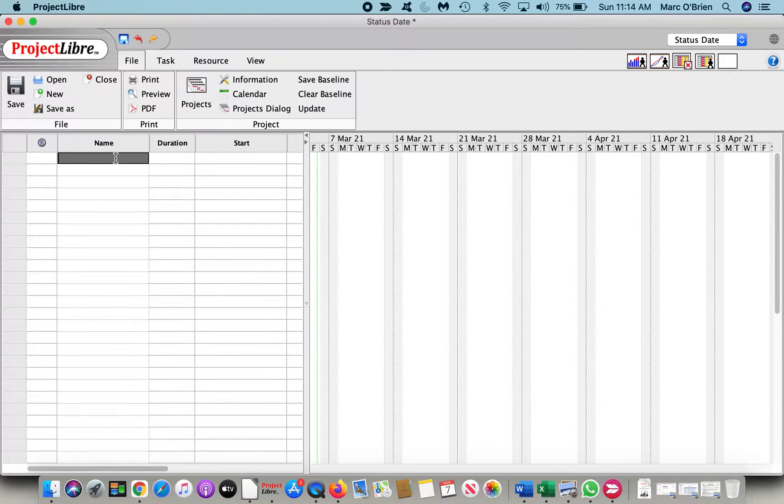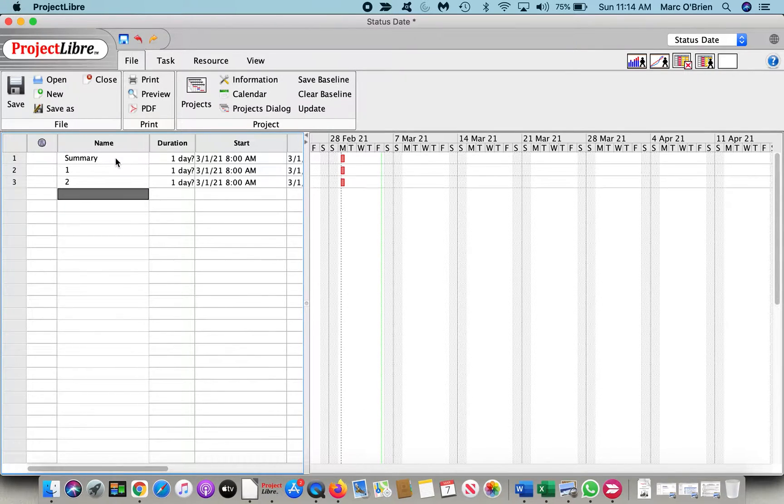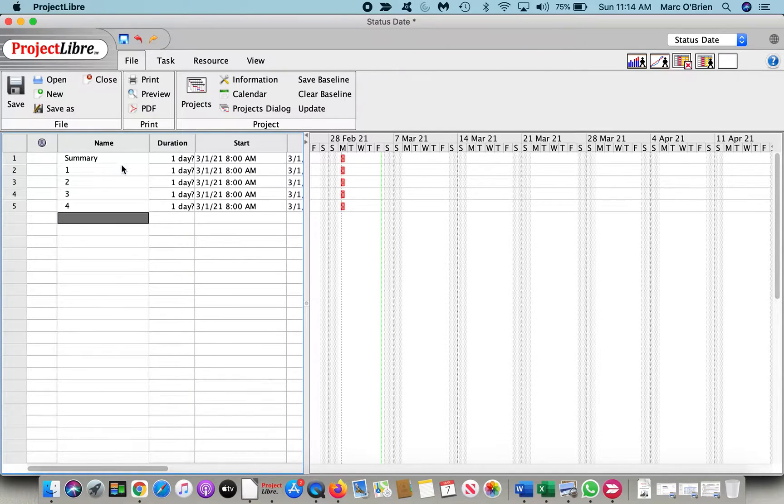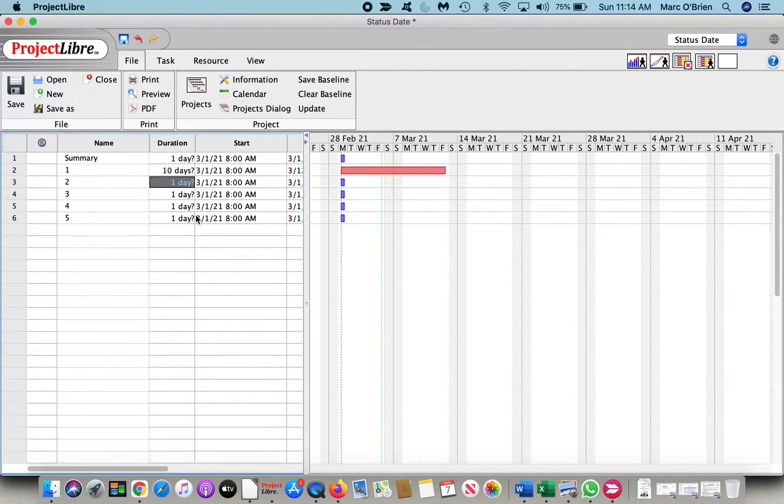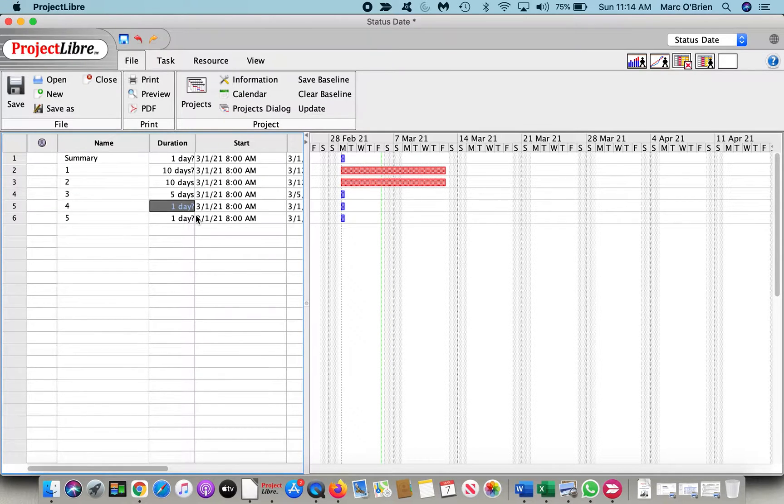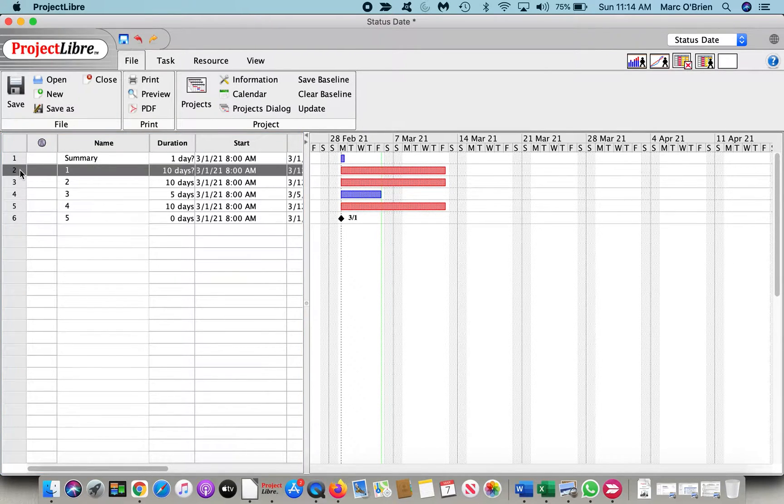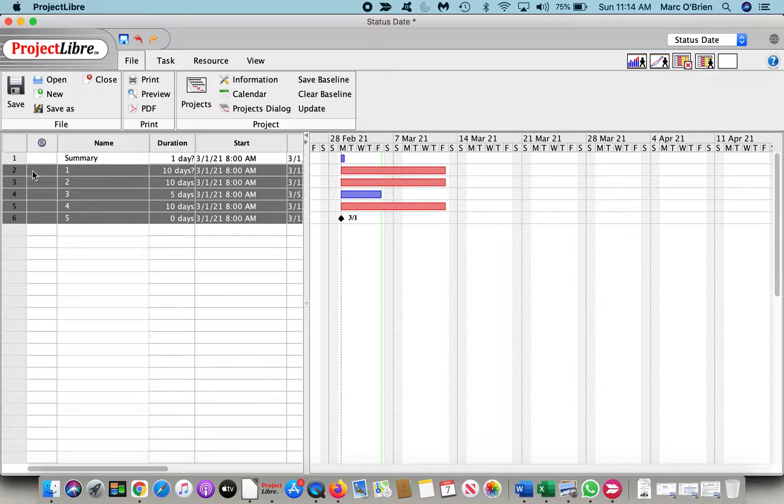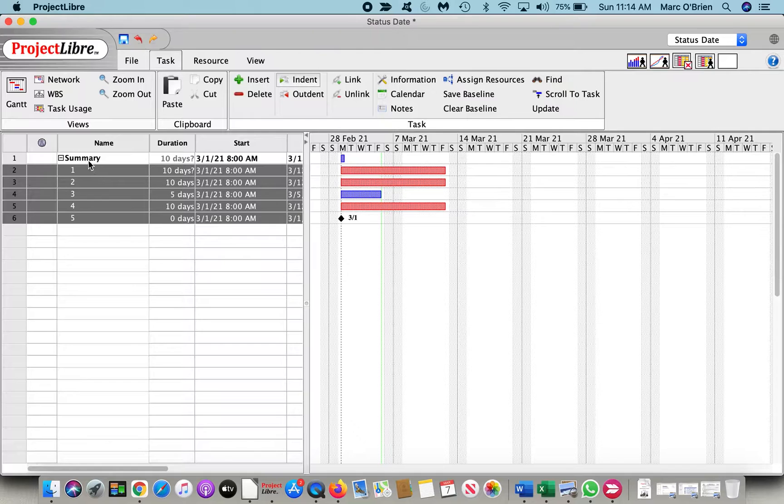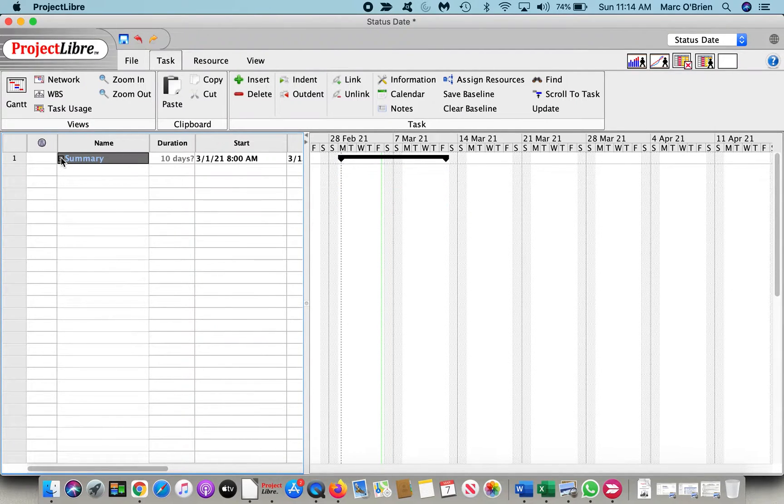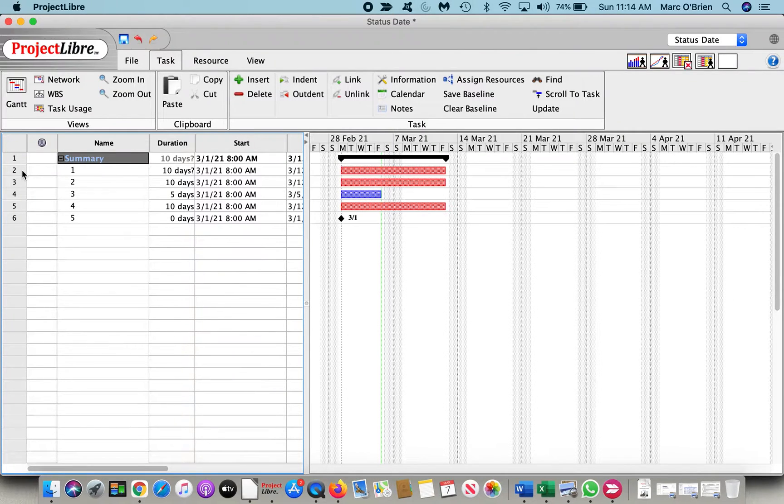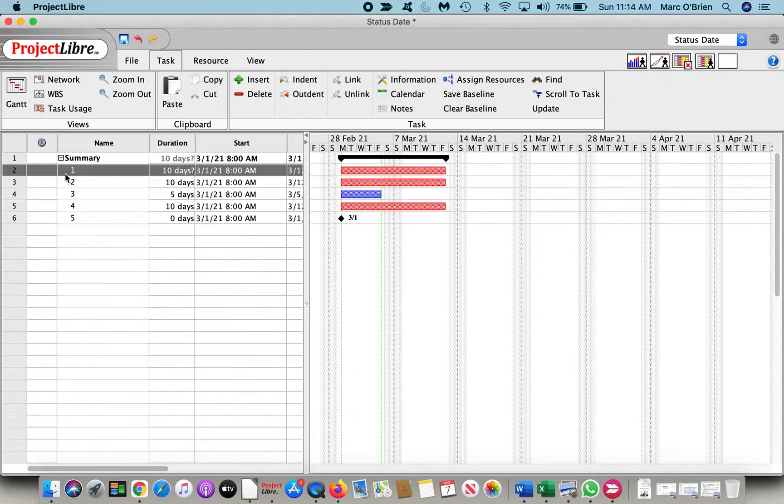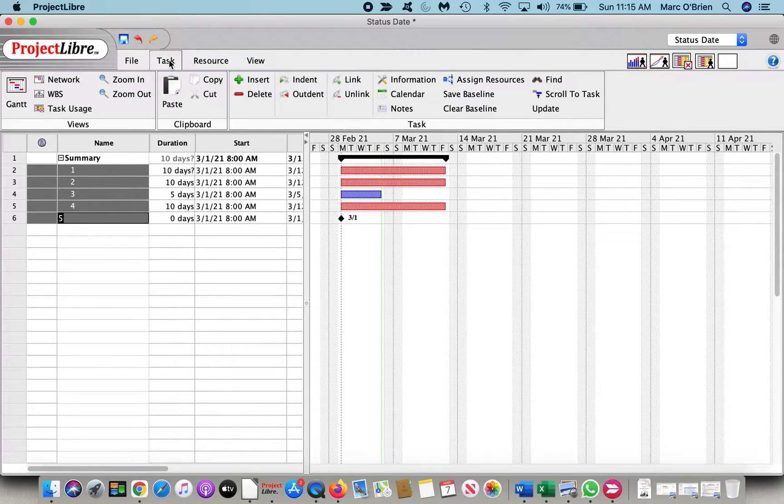And let me enter a series of tasks. I'll just do summary. One, two, three, four, and five. And let me give these dates. I'll say this is 10 days. 10 days. And we'll get a milestone. One thing is if I highlight these tasks, you probably have already seen this before, but if I go to task, I can indent and create a summary task. So now the summary task is created, and I can collapse or expand that. Another thing that we didn't really go through before, but I'm linking tasks. Let me highlight and shift and select all of them, and I'm going to go through tasks, and I'm going to link these. As they're all highlighted, they will link in serial.